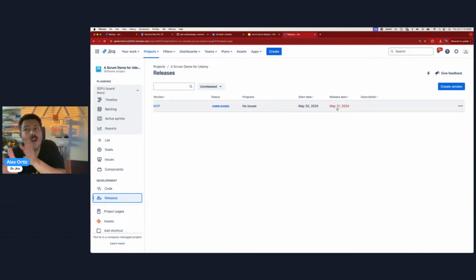Because if we are planning to work on a story that's in a release 2 months from now, it would seem silly to be doing that when we have a handful of releases that are due like next week that we haven't even started, right? And so again, these releases are going to allow you to really determine this priority of when things should be going out.